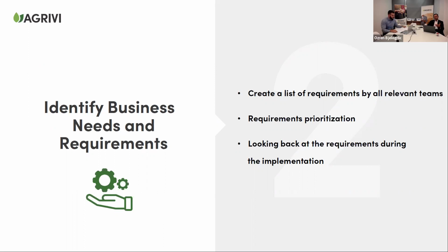Yes, maybe just a comment additionally on that. So we are speaking about farm management software as products. So products that are already ready-made with available feature sets. So of course there are sometimes requirements for some specific customizations, add-ons, which can be a burden for products as well. So when thinking of those, it is really important to highlight what is a must-have, what is a could-have, what is a should-have.